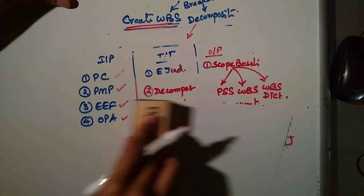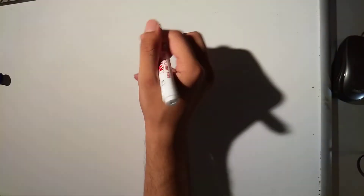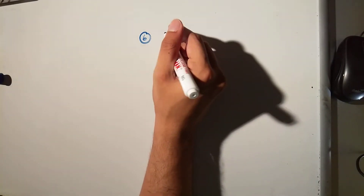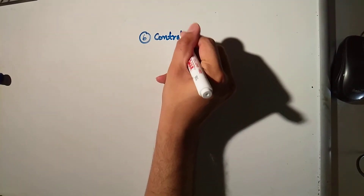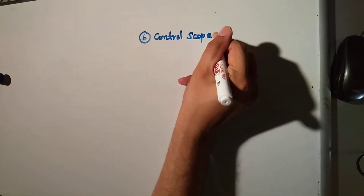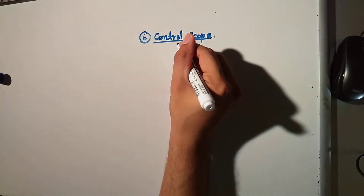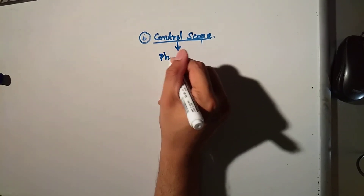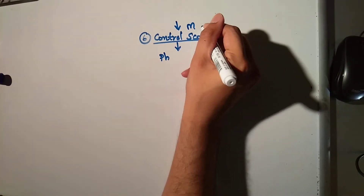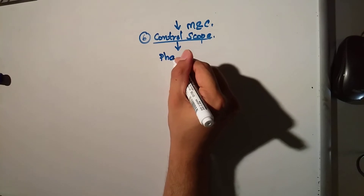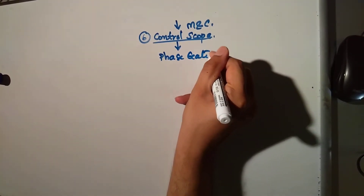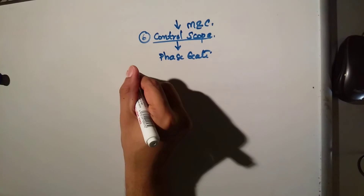The next process is Validate Scope, but personally I prefer to go to Control Scope first — that is the sixth process in chapter five, Scope Management. Control Scope is a monitoring and controlling process. It is like a face gate — you are comparing between what was planned and what was executed.